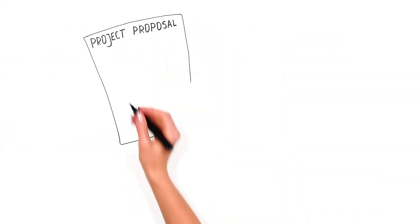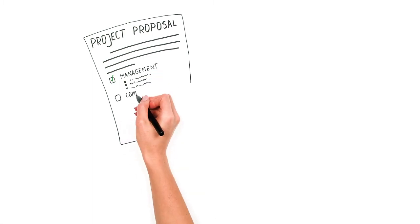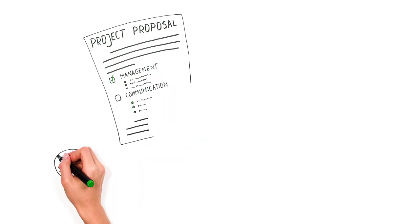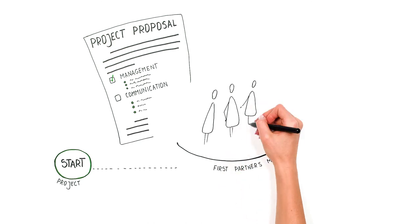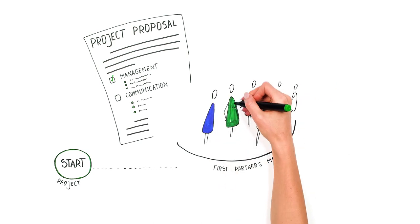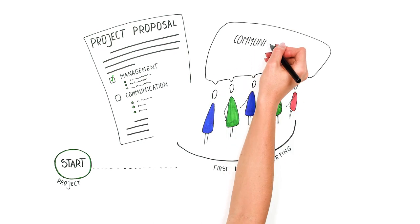Both aspects of management and communication must be described in the project proposal. When the project starts, the first partner meeting can be a good moment to get a better understanding of communication peculiarities of each partner and review communication agreements which are defined in the project proposal.